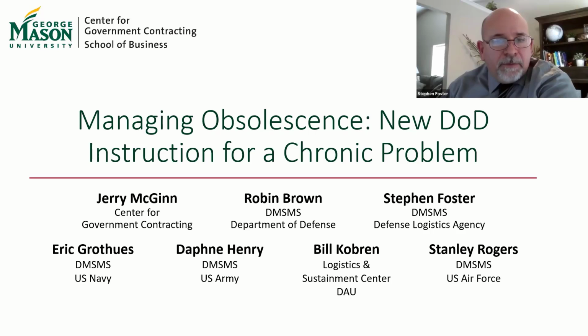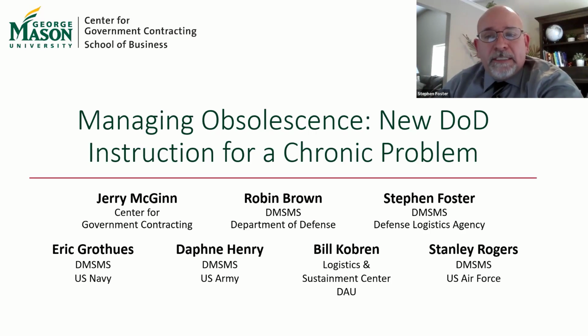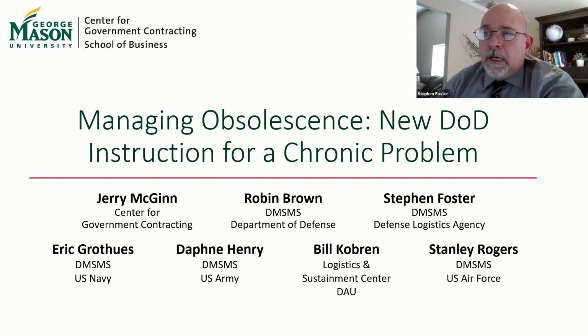I can kind of address really the first part of that question. One of the things that we see at DLA, and keep in mind we're not at the systems level, is that when we work on a DMS issue and we might find a source or go back to a manufacturer to produce something, we may only see a requirement or a need or a back order. A lot of times back orders will generate our DMS cases also. We may have a back order for 5 parts. We only need 5 parts. This is the lifetime of this vehicle, this system. The problem is we'll find a manufacturer, but of course in the manufacturing community, they can't or don't want to make 5 parts.